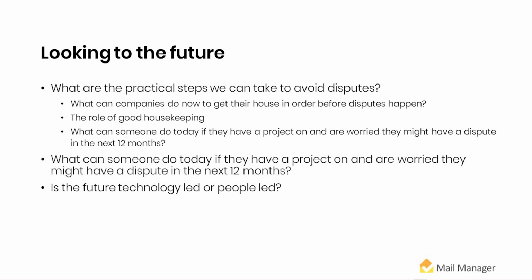And there are many, many reasons for that. But there's a lot of talk at the moment about how we define a golden thread. Is it a list of requirements? Is it a concept? And so the Building Safety Bill focuses more on ensuring that the gateways that we have in construction projects are hold points where we check information about security, we check quality of what's happened to date before we pass on to the next project team. So there are gateways at the end of planning, at the end of design, and at the end of construction.